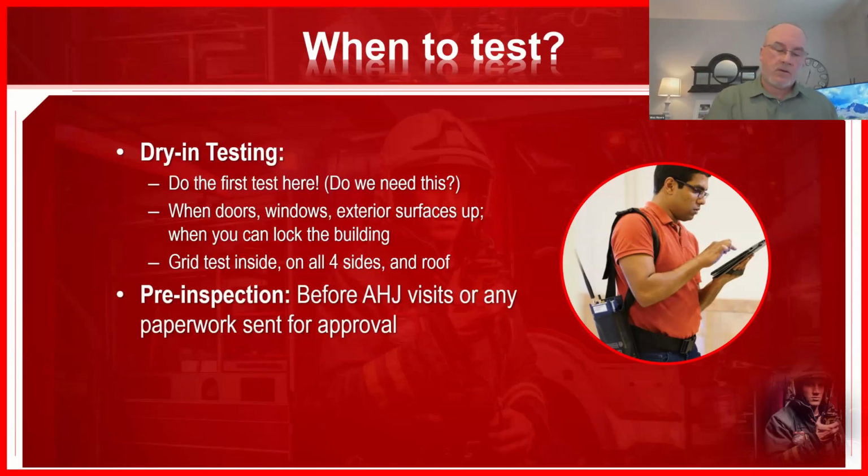So then you design it. Usually the installer will design it for you with the help of the manufacturer. We help with that as well. And then they will put it in. And then sometime before you're going to have your AHJ come in, you want to do that second test, which is a part of the testing cost to start with. Everyone knows you've got to test it again to see if everything passes, if there's some tweaks need to be made or whatever. Okay. And then you bring your AHJ.